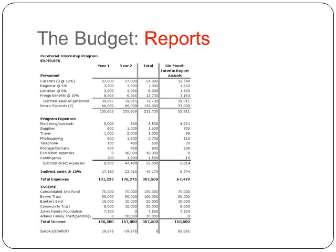Here is an example again of our 2-year project, and this funder required an interim financial report at the 6-month period. So you can see I've presented year 1 and year 2 in the total exactly as they were before. And then I've shown on the side what we had spent as of 6 months, both in expenses and in income. And the fact that after 6 months there's a very large surplus of $83,000, that's fine, because we knew we were going to spend it all by the end.